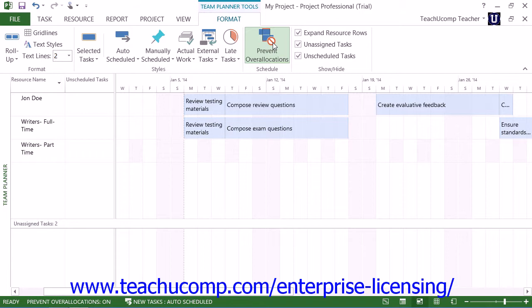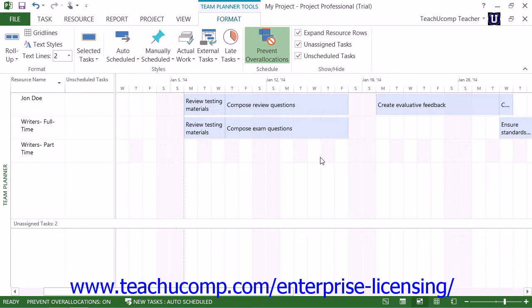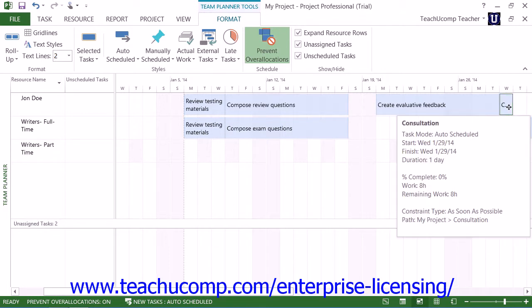When enabled, this feature prevents Microsoft Project from over allocating tasks to resources as you click and drag them around in the view. Also, if there are any existing resource over allocations in the project file when you click this button to turn it on, Microsoft Project will automatically resolve the resource over allocations by moving the scheduling of the tasks for the over allocated resource.